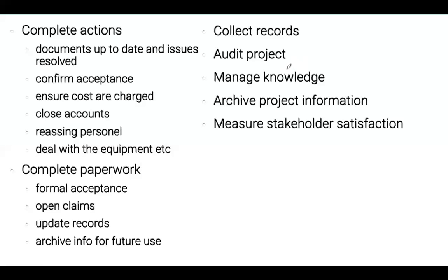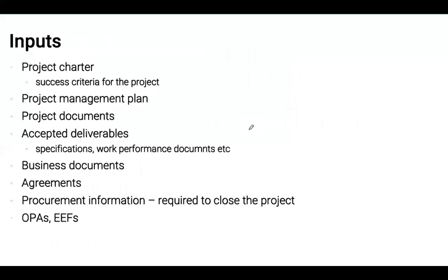Auditing the project might be a good idea to see what didn't go so well, and how we can learn from it for the future. The project management office might take the lead on that, if a project management office is available, because these would be the people in a position to develop the maximum amount of reflection on the project performance and then utilize that reflection to improve future projects. And then you measure stakeholder satisfaction to see how well you've done in the opinion of people who care about what you did.